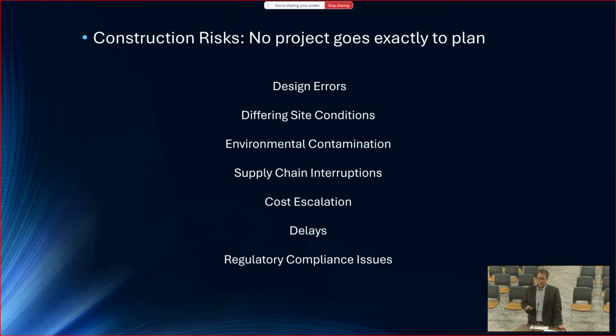But anyway, I use it to illustrate this point where no project goes exactly to plan. Your contractors are very savvy to this. To the extent that you just draft a contract that pushes any of these types of risks onto them, they're either going to walk or they're going to jack up the price. And so between Rob's department and my department, we're trying to find the balance there, where you've got a contract,